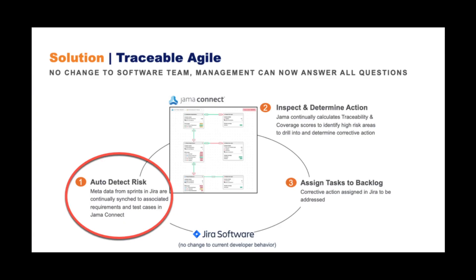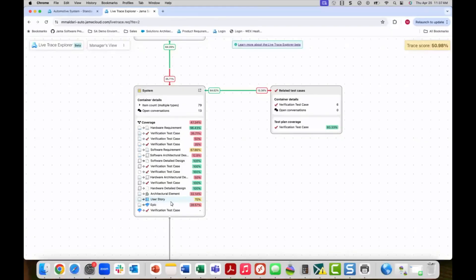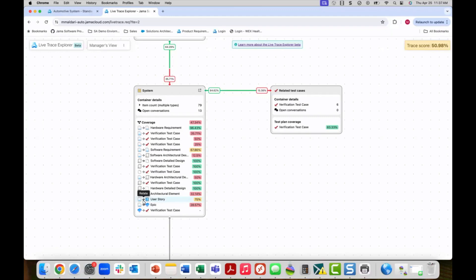As you recall, step one of traceable agile is identifying exceptions in activity to what was expected in the traceability model. Observing the software to user stories relationship, you can see that we are working towards 100% coverage, but are currently still yellow at 75%. As a manager, I can deep dive into this area and be taken directly to the trace view for these relationships.